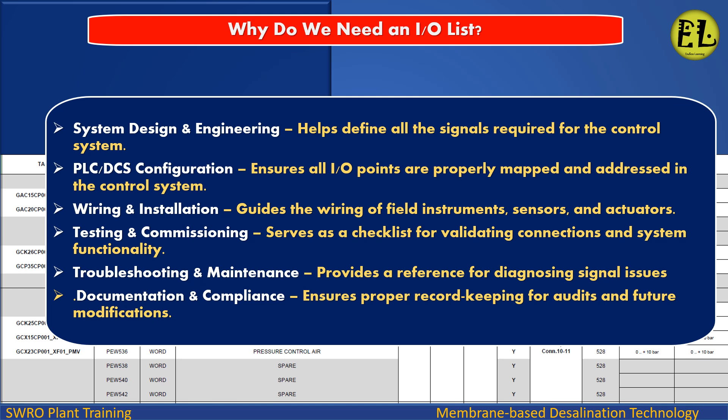Why do we need an IO List? System Design and Engineering: it helps define all the signals required for the control system. PLC/DCS Configuration: it ensures all IO points are properly mapped and addressed in the control system. Wiring and Installation: it guides the wiring of field instruments, sensors and actuators. Testing and Commissioning: it serves as a checklist for validating connections and system functionality.